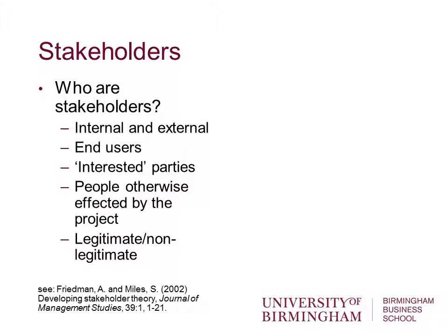People otherwise affected by the project, and stakeholders can be legitimate, in other words, have some sort of contractual relationship with the organisation delivering the project, or non-legitimate, maybe protesters, or people who are unhappy with the project in some way, but aren't contractually involved in the project.